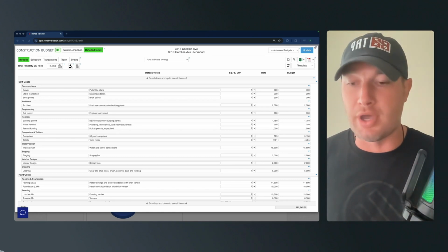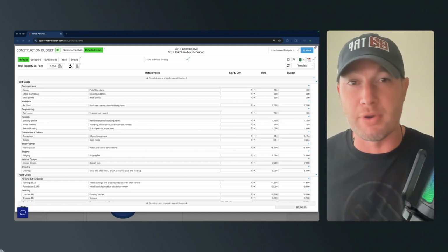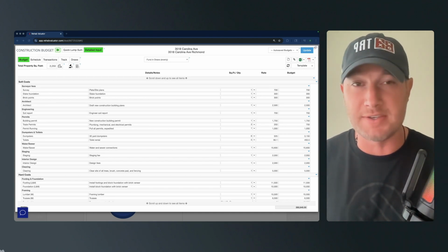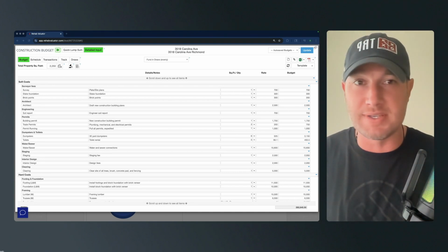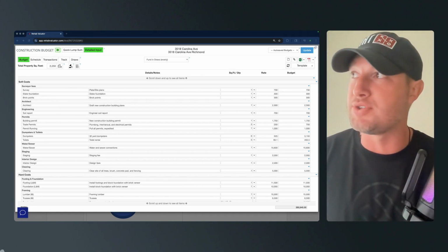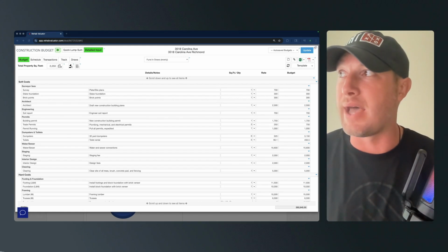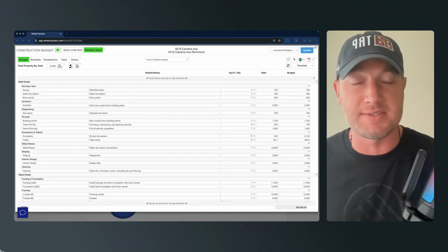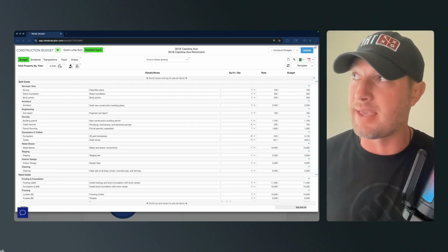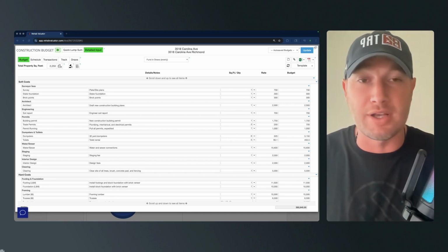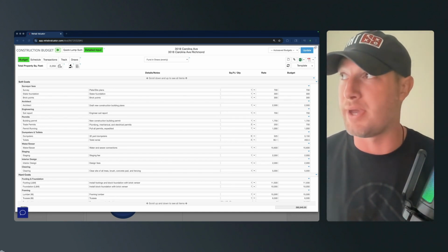And some of these are going to be more vulnerable for people who are making the transition into new construction that have never had to do stuff like this before. Some of these are just a vulnerable spot for everybody. Okay, so surveyor fees, I think everybody knows you need a survey, but not everybody who is new to new construction knows that you're going to be paying fees during construction, like staking and brick points. And that's going to add on to your budget about $300 to $400 per trip.